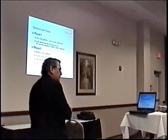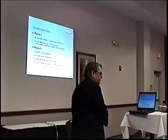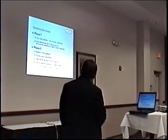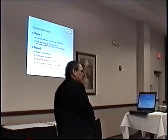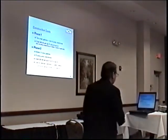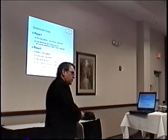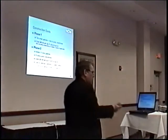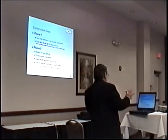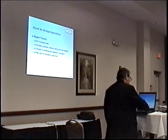We must remember that a standard sprinkler system in that environment is not like your normal warehouse, which might be $5 a square foot or something. It's typically $12 to $15 a square foot, or actually can be higher. So this is about 2 times the sprinkler cost in that particular environment. And that cost will be coming down. That will vary all over the place. There could be some small heritage buildings in which you use a 15-minute protection gas-driven pump system that doesn't require electric power, and you don't need to dig underground and bring in additional water supply. It's all a self-contained, pre-engineered system. That might be pretty cheap. So these numbers are for this particular application, it's going to vary, but it's not going to be competitive to sprinklers for some time.